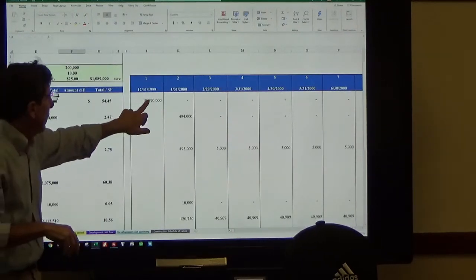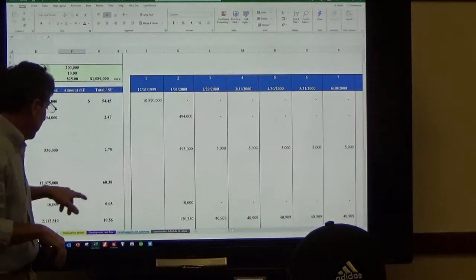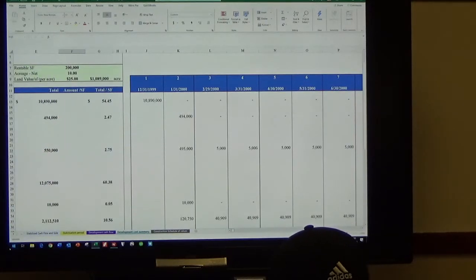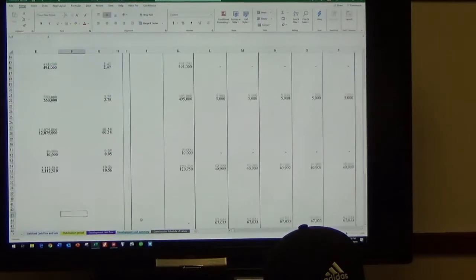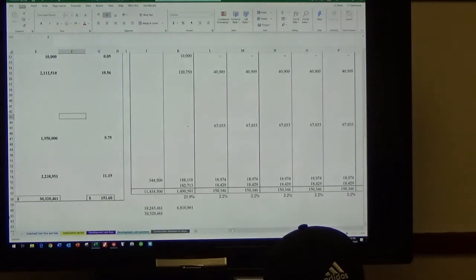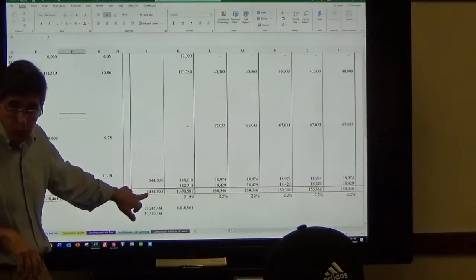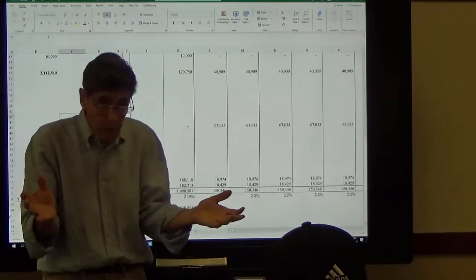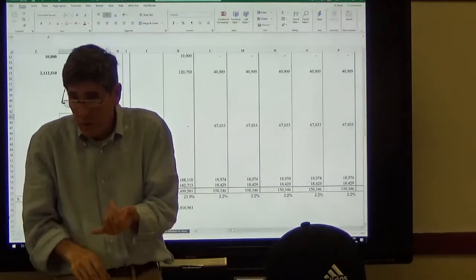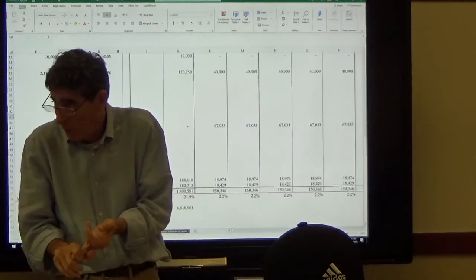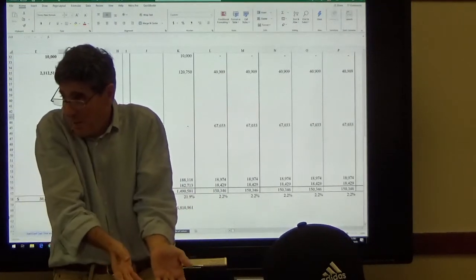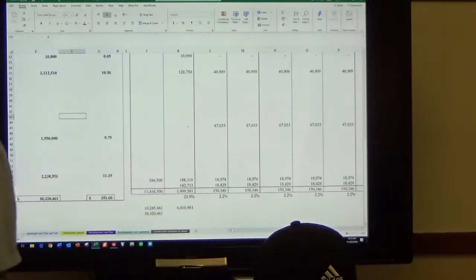And then I just went, okay, the land, but if I look at this, the building costs 30 million bucks. This building costs 30 million bucks, roughly 150 bucks a foot, okay? But I know lines 11 and 12 are 23. $23 million are very easy to schedule out. The contractor gave me that, and the land, which is the other big component. I know I'm getting it day 1. So the rest, just use your judgment.